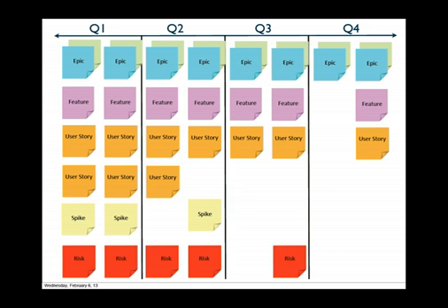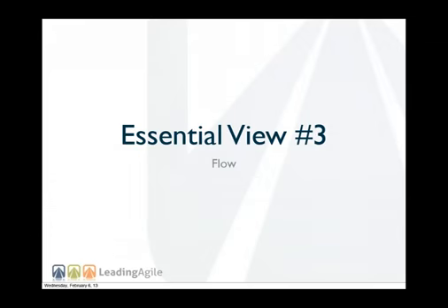So if I say that this epic is going to take 5 teams' time between now and the end of the quarter, as I'm decomposing those user stories, I'm not trying to figure out everything that I would like to build. I'm trying to figure out what is absolutely minimally marketable to be able to make that commitment a reality. I think that is a huge paradigm shift that we need to start thinking about, especially with Agile at scale. What solution can we deliver that can be realized within the time and cost constraints that we've established?